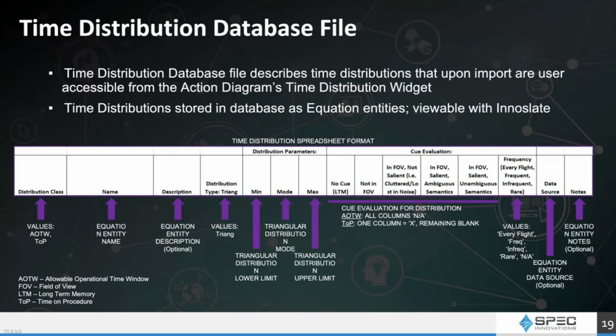Now, what's nice about that distribution is there are no tails. That's actually extremely useful in this kind of analysis, because the last thing you want to do is worry about tails of a distribution when you really want some more finite boundaries, and that helps you a lot. And by the way, if you're doing modeling and simulation of anything, using InnoSlate or Sopatra, those triangular distributions are a great starting point, because we always have used engineering judgment to do a lot of these things.